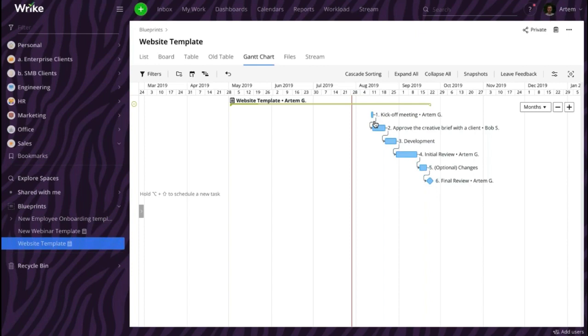What else can we see here on the Gantt chart? The majority of the tasks are represented as rectangles, right? But the key steps look like diamonds. That is because these tasks have been converted into milestones. When you're planning future projects that are going to be conducted on a regular basis, you need to make sure that you take into consideration what steps cannot be shifted, even if some other tasks get delayed. Making sure that all these tasks are converted into milestones is trait number 3.